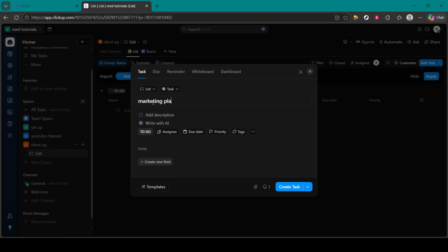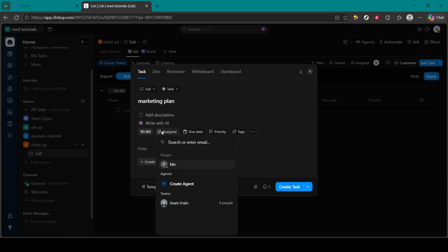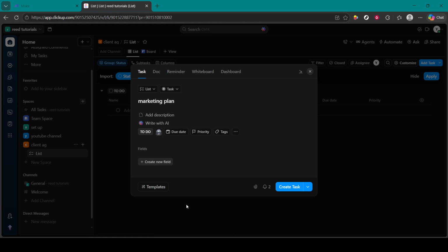In the folder or list, create a calendar view so you can see everything by week or month. Set due dates and, when relevant, start dates so timelines are accurate. Drag and drop tasks on the calendar to adjust schedules quickly as scope changes.